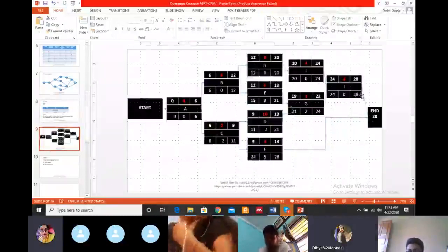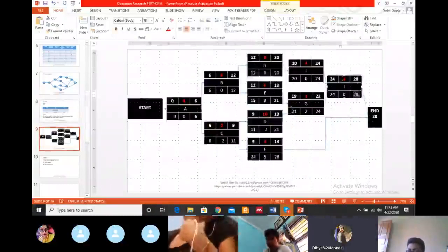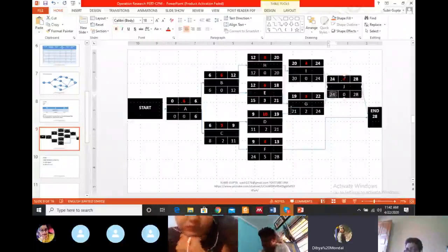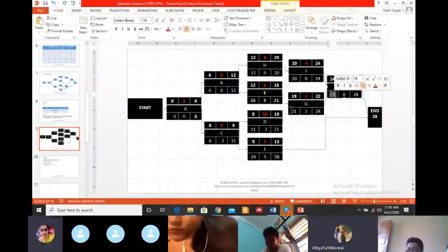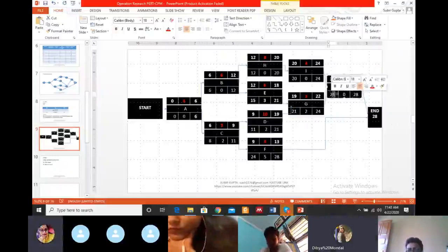Now 28 is the latest finish. Duration is 4. 28 minus 4, so latest start is 24. So what is the formula? Latest finish minus duration is known as latest start. Is it okay? Yes, sir. 28 minus 4 equal to 24. Is it okay? Yes, sir.